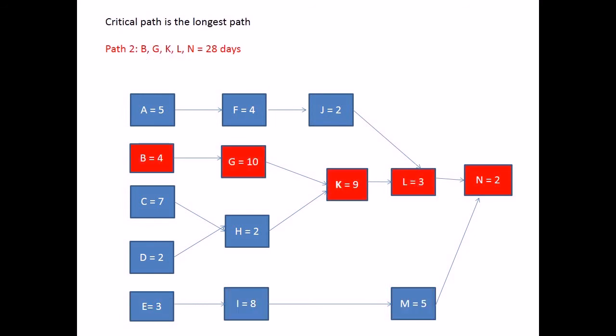Using this information you can now identify the critical path for your project, as it is always the longest. Therefore for this example, path number 2, highlighted in red, is the critical path, as it is the longest with the duration of 28 days. We also know that path 1 is the shortest. It will only take 16 days to complete. Therefore we know that it has the most contingency.